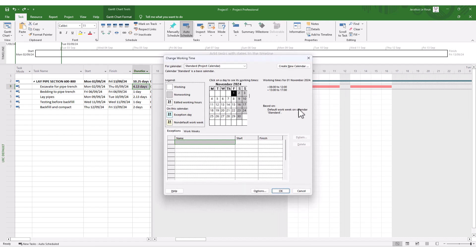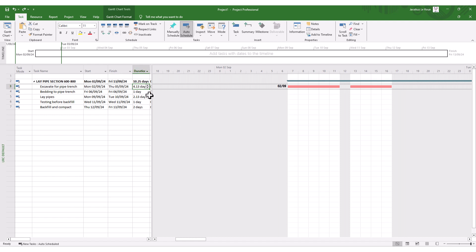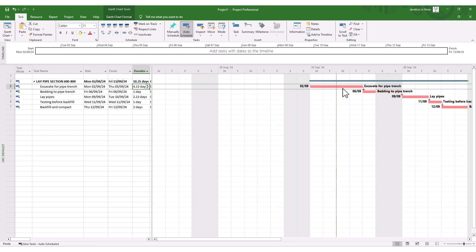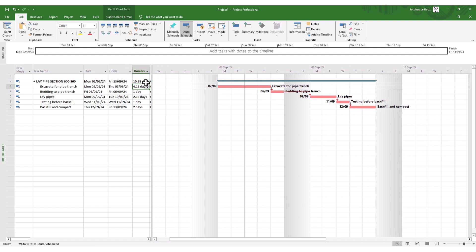So that's reason number one: make sure there's no mismatch between your working time calendar and the calculation parameters in project options. My advice — if you don't have resource allocations and you just want a Gantt chart for construction, never change your calendars. If you want to work 10 hours per day, that's fine — it doesn't need to be reflected in the calendar settings. Just keep yourself sane. If you want to change it and you're happy to deal with decimals, no problem, but that's how you prevent them.